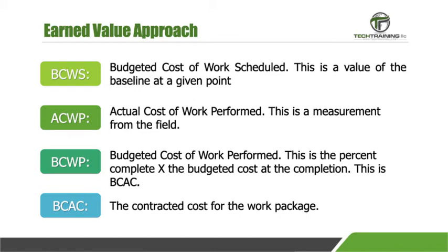This is the percentage complete multiplied by the budgeted cost at the completion, or BCAC. And remember, the BCAC is the contracted cost for the work package. These acronyms, values, and measurements are the same concepts as previously discussed. However, to put them into context, let's consider another small project.